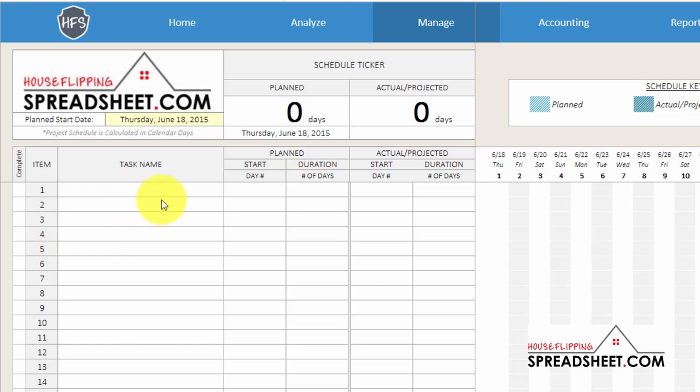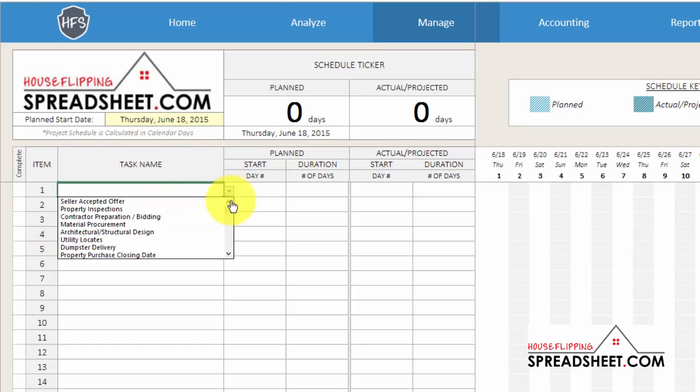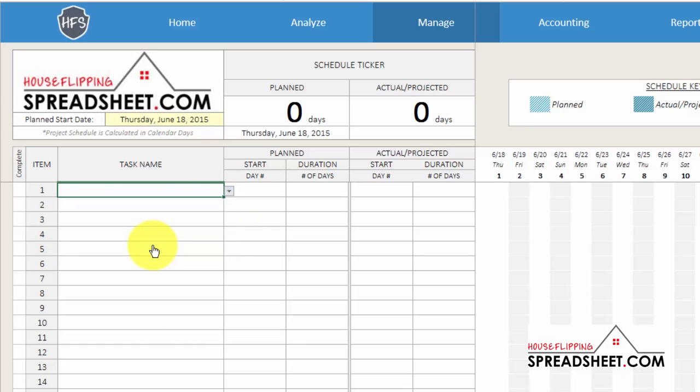The first task in our project schedule is interior demolition work, which will start on the first day of the project schedule and will take two days to complete.